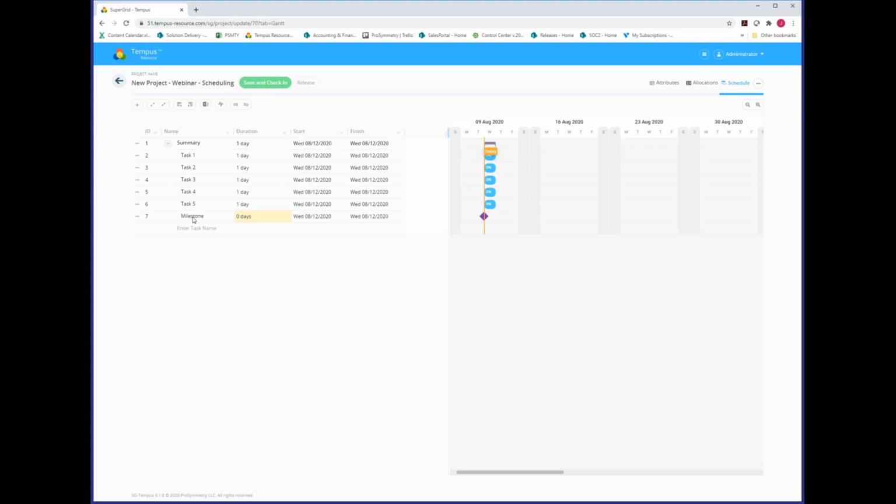The name can be really whatever you'd like. But what we would do to flag a task as a milestone is simply mark its duration as 0 days. All right, so we have indents, various tasks, task types, if you will, even though there's a separate type field that we'll come back to. And of course, duration of 0 to make this a milestone.